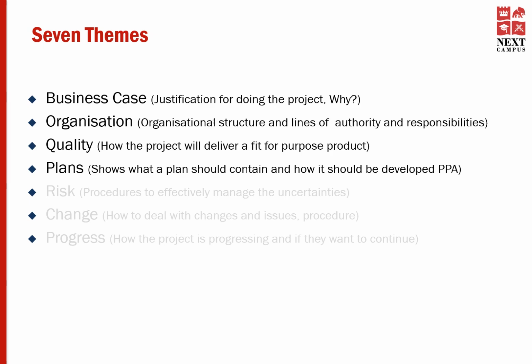A Prince2 plan is not just a Gantt chart. It is a lot more comprehensive plan. It is a document that describes how, when, and by whom a specific target or set of targets is to be achieved. These targets will include the project's product, timescales, cost, quality, and benefits. There's a lot of text in a plan to help explain what will happen.